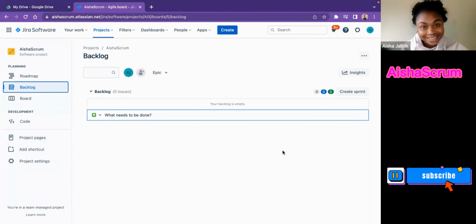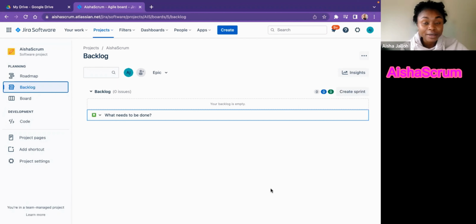And sometimes too, if you join a team, I remember when I joined a new company, I realized that I had to ask for access when I was a Scrum Master. I'm like, okay, I see my create sprint and it's blurred, it's there, but I'm unable to click on it. If you're a new Scrum Master, you join a new team or company, and you went all the way to the top of the product backlog and saw the create sprint icon but are unable to create it, that's something that is not given to Scrum Masters. Either the release train engineer or the agile coach will be closing and starting sprints. So it depends on how your company has this set up. That's something I will always ask access for.